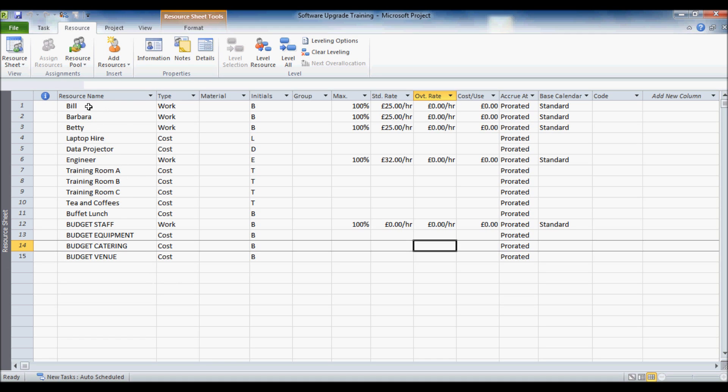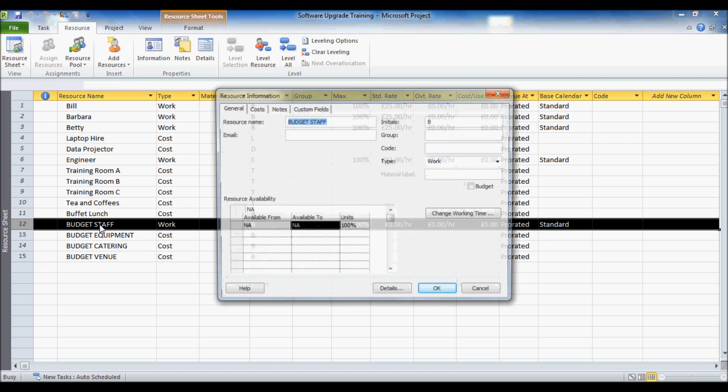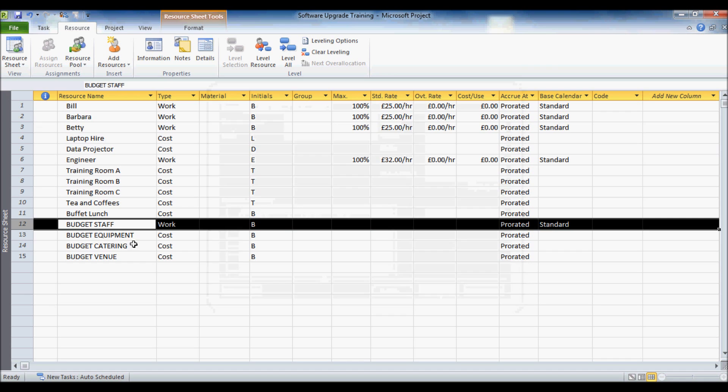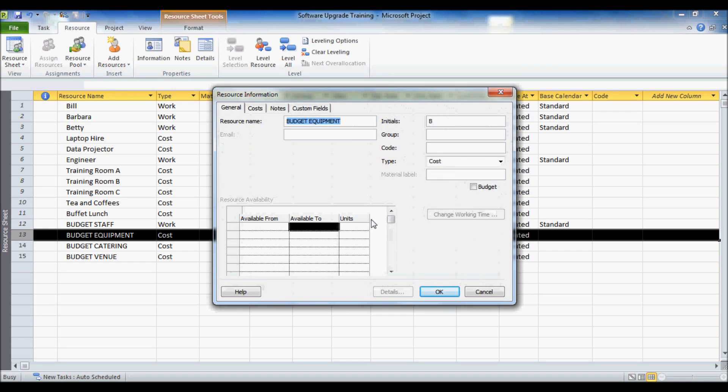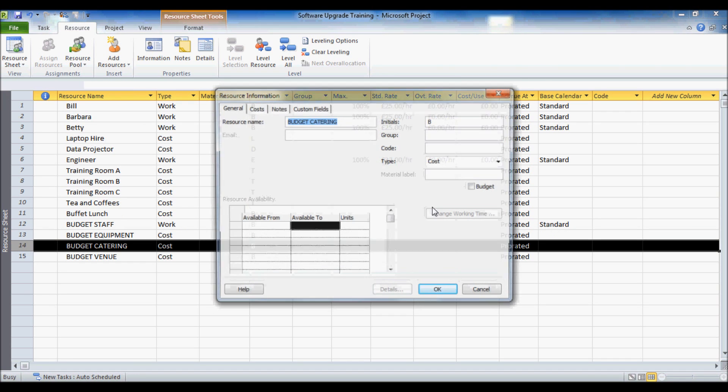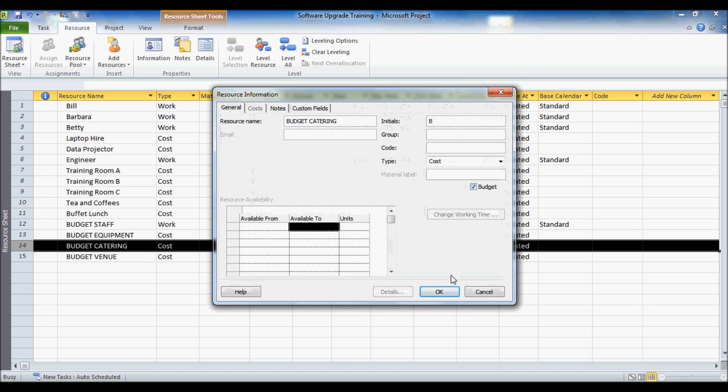Now I have set up these resources as normal, the ones in a normal sentence case, but these ones in capital letters are actually going to be my budget resources. Now to convert these to budget resources all you do is double click on the resource, click on this little budget check box. I am just going to do that for each of my budgets.